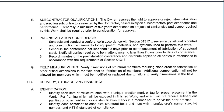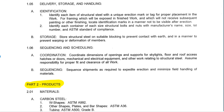It's really important that there's a pre-installation conference so everyone understands what is required by the subcontractor. Moving to field measurements, verified dimensions of members requiring close erection tolerances are critical, and a lot of times existing field conditions need to be verified as well. The delivery, storage, and handling section is somewhat boilerplate, but it requires the steel subcontractor to coordinate their work with other trades and sequence the work to expedite erection and minimize field handling. These general conditions work in conjunction with the whole division one section as well.